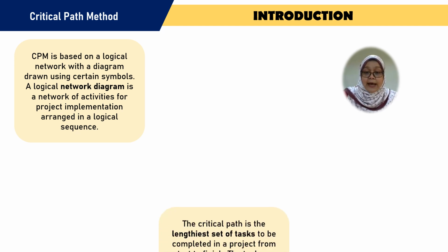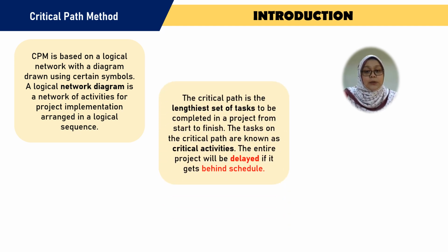The critical path is the lengthiest set of tasks to be completed in a project from start to finish. The tasks on the critical path are known as critical activities. The entire project will be delayed if these critical activities get behind the schedule.